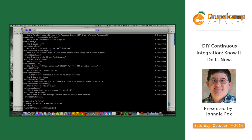We are piling this on larger projects with a timeline. I do find that it adds something like 10% to the project from the estimate. I want to say it's a little bit naive in the assumptions we had before — our company would always have this unexpected bug-testing phase when we got to UAT, going back. I'm on both sides of this argument with management: this is something we need to do so that we can have defendable, predictable estimates. On some projects, not testing works great. On other projects, it just goes to hell.